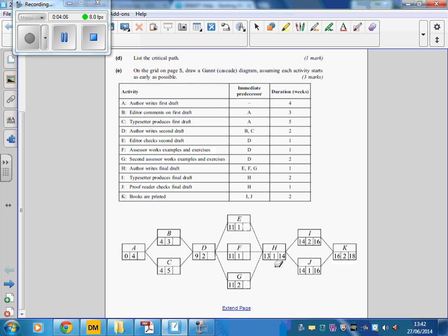Okay, continuing back here, right hand box take away middle gives us 13 for these 3 boxes here. Okay, and again, we've got 3 activities to consider for D. So in each case, we're going to need to use the smallest. Right hand box take away middle, smallest number there will be 13 take away 2, which is 11.